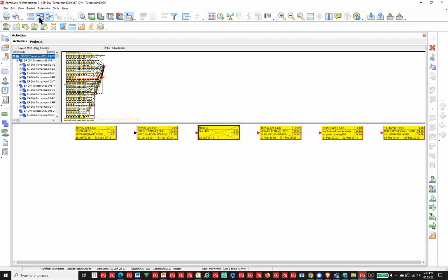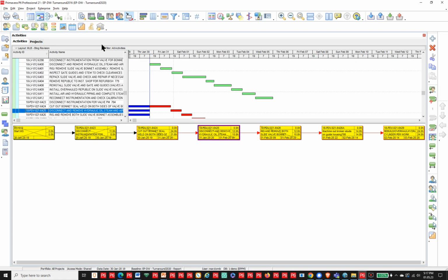So now, if I go back to my Gantt chart, I can see now I've got predecessors finished. I've got one started but not finished as a predecessor to the activity I have selected in the activity table. Now, this gives you very quick, easy reference points to tracing back, for example, out-of-sequence logic. There are other ways to find out-of-sequence logic, but I find this is a very quick and simple way of looking at it, because sometimes your out-of-sequence logic is back a couple levels or maybe even more.